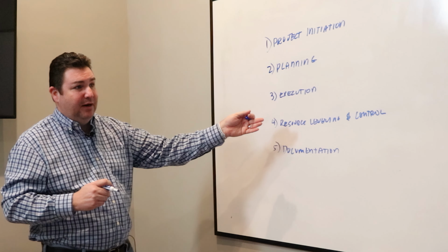So as we move down the list, number 6, risk management, right? So this is where we're putting that analytical hat on and we're going, okay, of all of these tasks that may be running slightly behind, what risk do they represent to the overall success of the project? And then how do I manage that? So does that mean that I am bringing in the resourcing and leveling portion of it? Am I going out and adjusting the plan accordingly? Do I say, I was on the 4-week side, now I need to go to the 6-week side and make sure I set expectations in week number 2 so that we're not an overall disappointment in the delivery.